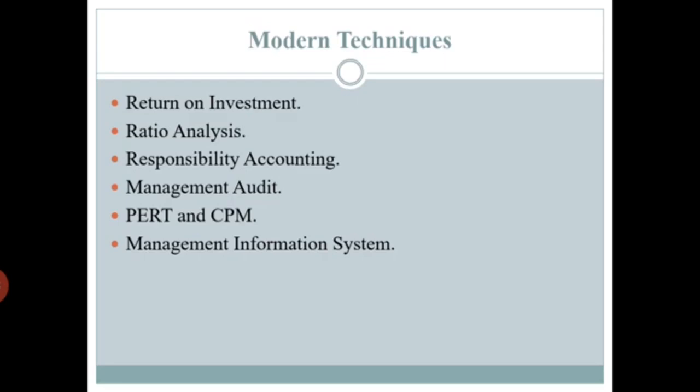It is the amount of time by which an activity can be delayed without delaying the project. Since the slack time for the critical path is 0, it represents the shortest time during which the project must be completed. Managers must focus on the critical path. Delay in completion of any activity along the critical path by 1 week will delay the whole project by 1 week. The critical path has to be shortened if the project is to be completed before the time specified.